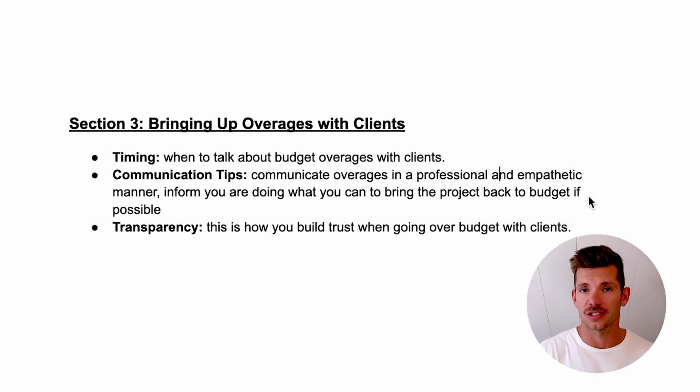If you're starting to lose some trust with the overage, also know that sometimes homeowners are very strict, or clients are very strict on budget, as you may already be aware. So know that if you are getting overages, having this transparency may give you an opportunity to change something down the line. Like, let's say they picked a paver that was $10 a square foot. Maybe your supply yard stocks them, right? So it's not like it's a special order or anything. Maybe being 1,000 or 2,000 over on something that happened that week is enough for them to want to change the material, okay? Maybe if they can drop down to an $8 or $7 square foot product, maybe we can bring that budget back in line, and then you can finish the job at the right number for them.